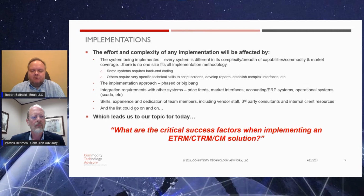We also build those scripts rather than a spreadsheet load or something like that, because the scripts are much more repeatable. Once you build them and have them working, you may do an initial data load, then you'll do another one to build a test environment. You'll do another one to build a UAT environment, maybe a training environment down the road, a parallel test environment. So you're going to be reusing these scripts over and over. The little bit of time and money you invest up front is going to pay dividends in the end, in efficiencies.